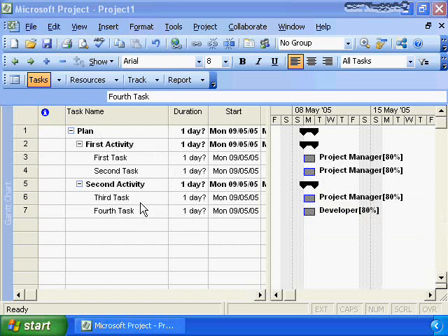We developed our work breakdown structure, we added our resources to the Microsoft Project plan, and then we assigned the resources to specific task elements. Our last step is to add the estimates to Microsoft Project so we can define the work that is required to complete the tasks. This is an area where the standard view in Microsoft Project does not support project management as defined in this nugget. Project management is defined in the PMBOK.